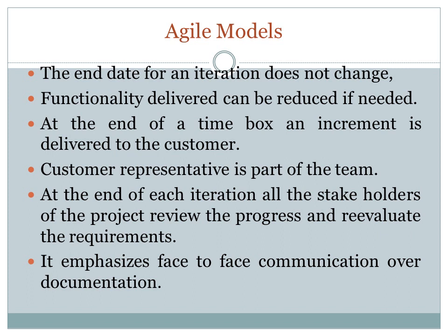At the end of a time box, an increment is delivered to the customer, and a customer representative is always part of the team. At the end of each iteration, all the stakeholders, including the customer, review the project, look into the progress of the project and re-evaluate the requirements. It emphasizes face-to-face communication over documentation.